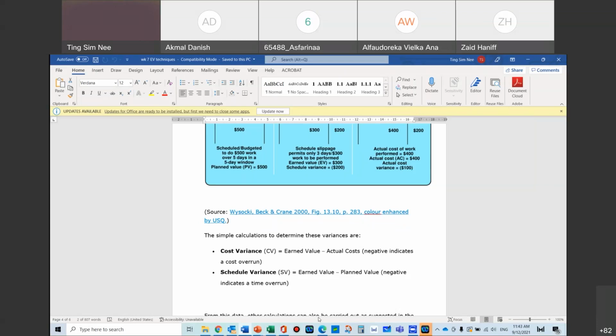You need to recognize, because a lot of students, when they come to this question, they don't recognize what is AC, PV, and EV, you see. So it's all in the keywords. It's all in the wordings that you need to pick up. So then they have actually done 2 hostels. Budgeted cost of 2 hostels is how much? 4 million. Okay, so you have your 8 months, your 9 months, you're supposed to spend 4.5 million. So your PV is 4.5 million.